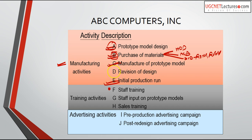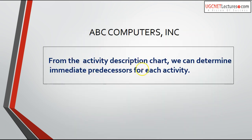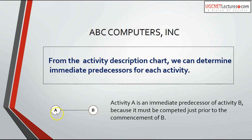After the manufacturing activities come initial production and staff training. Then there are training activities and advertising activities — pre-production advertising and post-redesign advertising. From the activity description chart we can determine the immediate predecessor for each activity. For example, activity B cannot start before activity A is completed — activity A is the immediate predecessor of activity B because it must be completed just prior to the commencement of B. Like this, we generate the activity description chart from the set of activities.